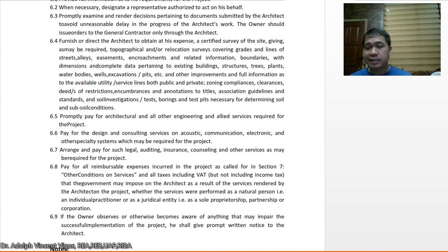And if the timeline is affected, guys, then the construction is delayed. And if the construction is delayed, then the contractor may pay for LD or liquidated damages already. So the owner must come clean with the architect and the team, he or she must inform us beforehand.